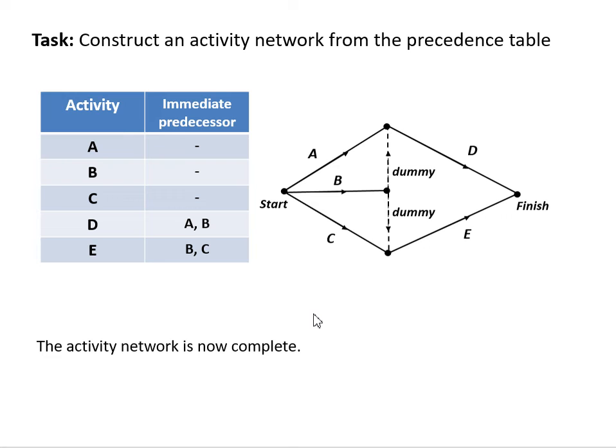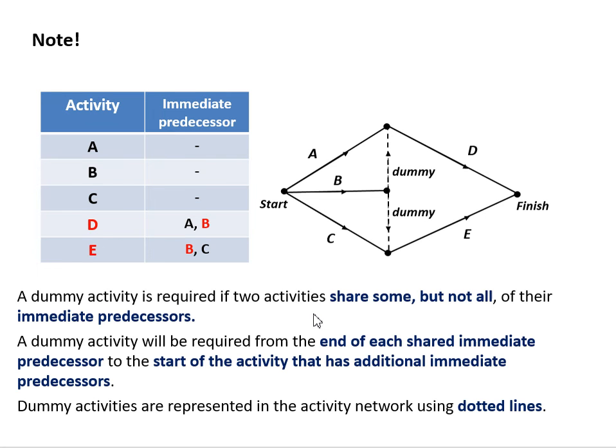So we've now completed our activity network. Just very quickly, we can see that a dummy activity is required if two activities require some but not all the immediate predecessors. And our dummy activity is drawn at the end of our immediate predecessor down to the beginning of our next activity. And finally, we use dotted lines to represent our dummy activities.